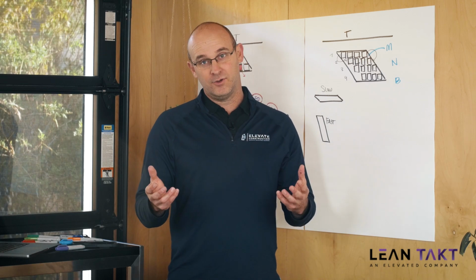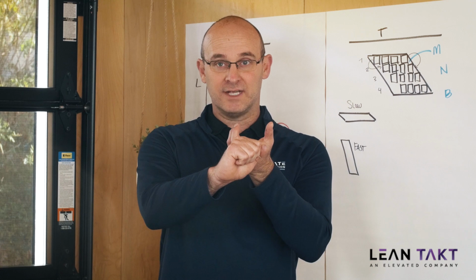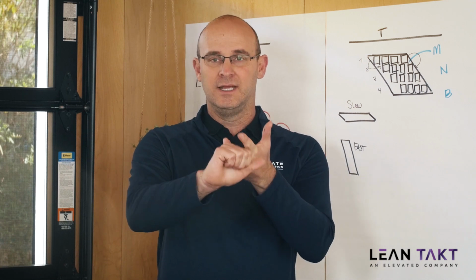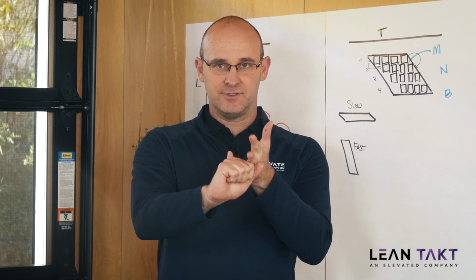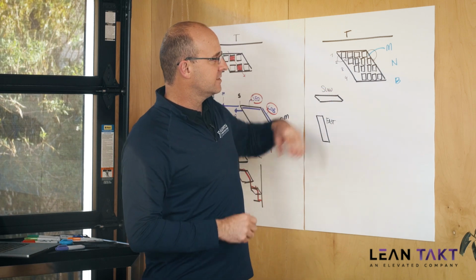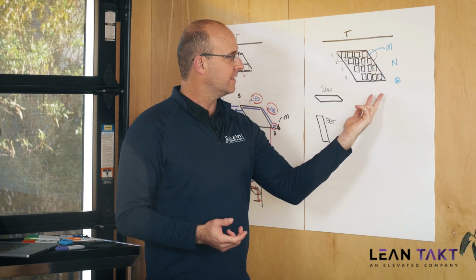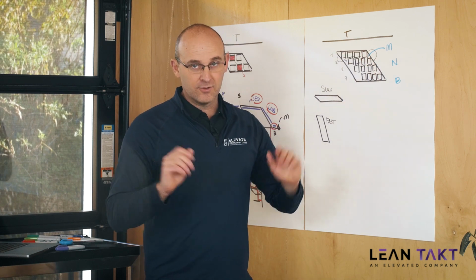And you obviously know, because Little's Law says that you will go faster with smaller batch sizes as you level work and finish as you go, that if we went from 4 zones to, let's say 6, this would incline and we would gain buffers here at the end.